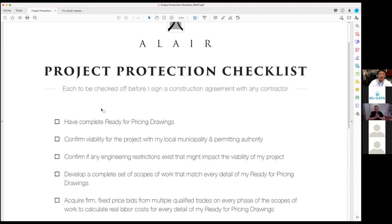Great. We have a question for another contractor that I want to pose to you. Do you also work on condominiums? Yep. It's important to point out, though, that condominiums are, by Virginia code requirements, considered commercial. So your contractor that works on your condominium has to have a commercial designation in his license to do that. It's a different set of inspectors. It's a different overall requirement.